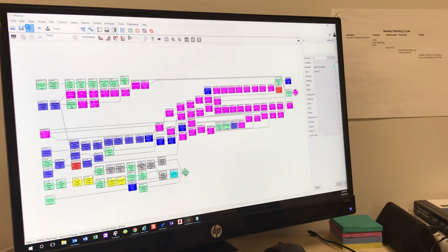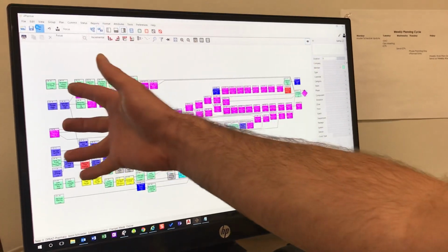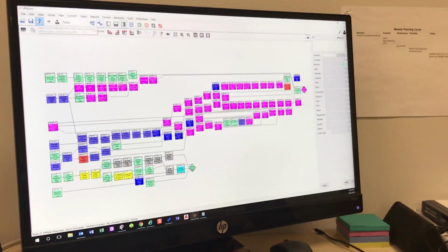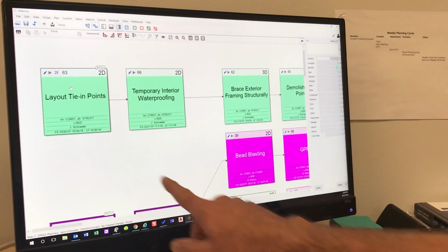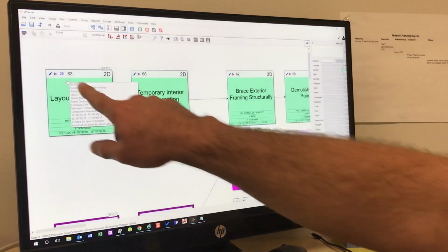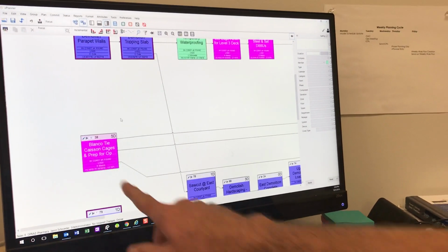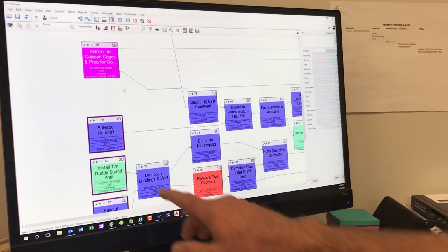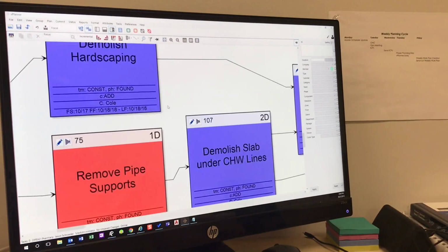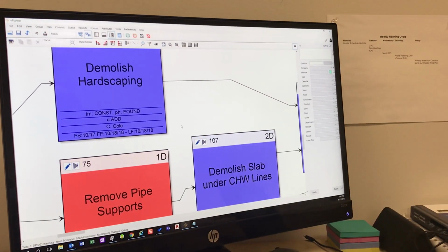The other thing that I forgot to show you before is if you have a milestone and you hit this refresh database button, it will refresh and do a statistical analysis that shows you when you have to start some of these activities. So not only will it show you down here when that activity has to happen, but on the first string along the line, it says you have 25 days until you have to start that one. You have 12 days until you have to start that one. You have 7 days, 11 days, 11, and it runs through and actually calculates the dates for the forecasted start and late start, late finish.